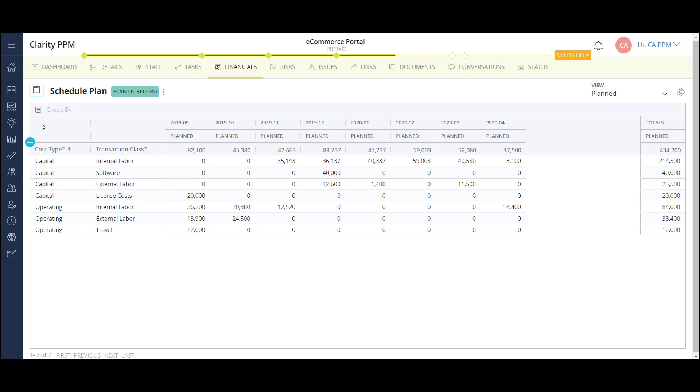A common challenge I see with several customers is reconciling project data with the financial team. Oftentimes, the project costs are broken down based on the limited categories of the PPM solution. Then the finance team has to dig in and translate the costs into their own terms. Here, we're able to configure this solution in a way that matches the project cost nomenclature with the finance teams, helping to reduce effort during closing periods.